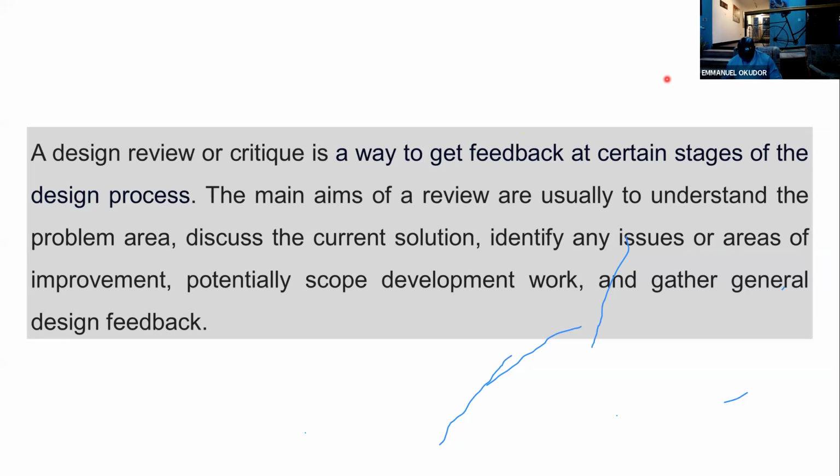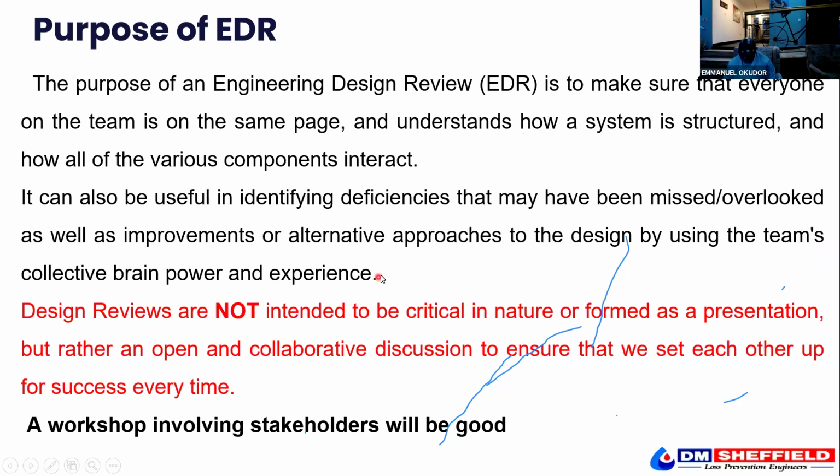When I see engineering design review issues, I put a comment to go back to the drawing board and get it right, integrate it into the drawing. At some point, if they are very critical issues, then you have to come back and do the PhD again. So that is the importance. And in doing all this, what we're trying to do is to improve system design. The improvement of system design, identification of process hazard, will certainly lead to what? Reduction in process safety incident.